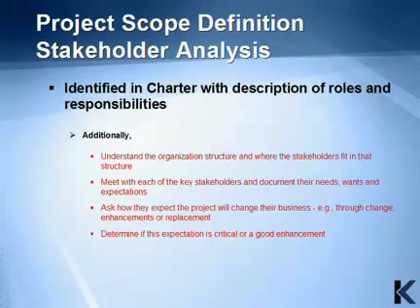This is the time to make sure the stakeholder list is complete and no key stakeholders have been missed. If a key stakeholder suddenly shows up in the middle of your project, the results can impact your budget, schedule, and various other plans. In the next section, we'll discuss the output of this process.